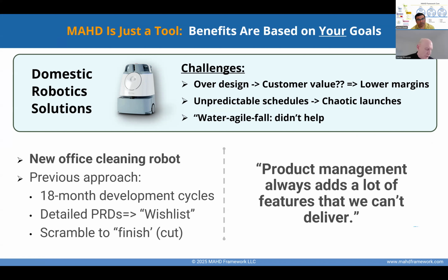And the problem was the focus was always more on getting the features R&D could actually develop than on what customers really found valuable. And often near the end of the project, it was always those P1, those high priority features that would get cut because they were the hardest, and that allowed them to hit the schedule. So the nature of waterfall is often making those bad trade-off decisions.